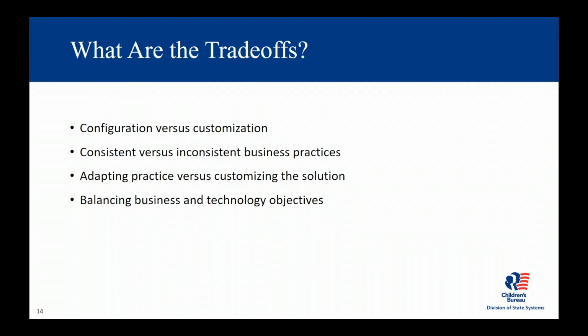The trade-off for the project is how to make the best use of the low-code solution and still meet their business requirements. Most projects will need assistance to help with this trade-off analysis. Reducing unnecessary complexity is important for low-code solutions to avoid customization. One good approach is to look for inconsistent business processes across the organization to determine whether these variations are necessary or whether the processes can be standardized.